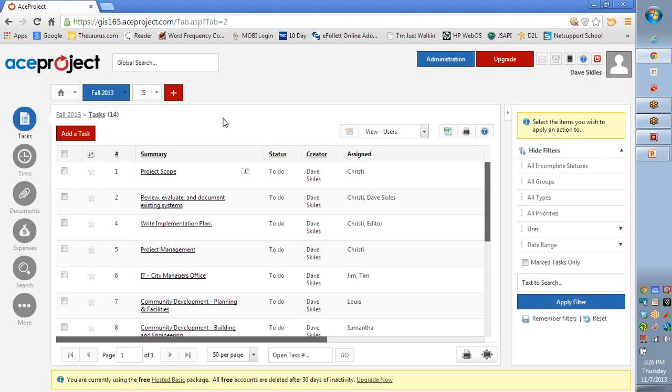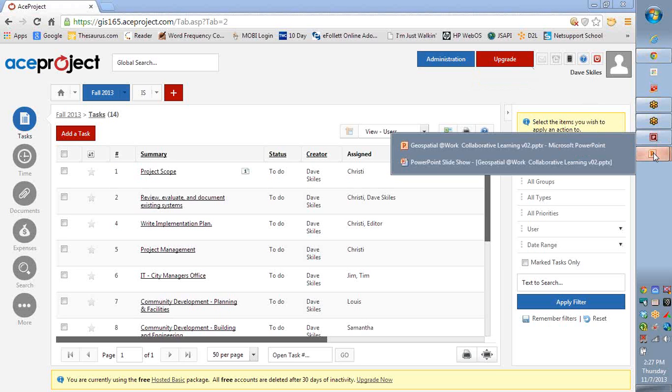Well, as far as scheduling goes, we took the schedule hours on the beginning date. We started that Monday, June 9th, with 3 hours of making an initial assessment, trying to make contact with the IT department in Sacramento, sending them an email questionnaire, asking for their wish list and what they would want. So between the 9th and the 14th, we're going to give them a week to return that questionnaire.